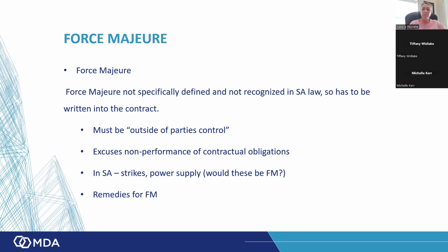The employer says, well, I can't produce coal, let's say, while the force majeure event is occurring. So why should I pay you your standing time? And they have this backwards and forwards. And the best time to actually negotiate this clause is at the beginning of the contract, because nobody wants to take this risk. Employer doesn't want to pay, contractor doesn't want to take a claim for extension of time with no cost, and it ends up being quite a hectic deadlock.